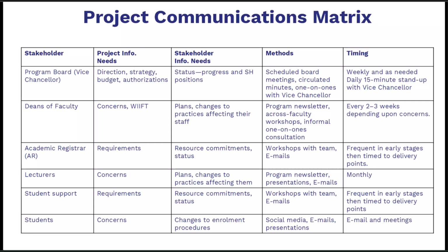Sponsors use it to judge whether work will finish on time and within budget, while many stakeholders focus on details relevant to their own functions. In healthcare management, mirror this for hospital leaders, service line directors, information leaders, clinicians, patient access teams, and patients. Match needs to channels such as governance briefings, workshops, huddles, education sessions, electronic mail, and portals, and set cadence by group: daily, weekly, monthly, or as needed.